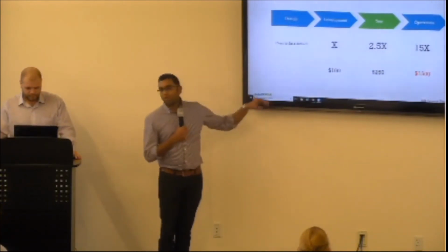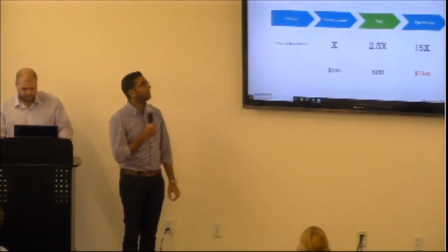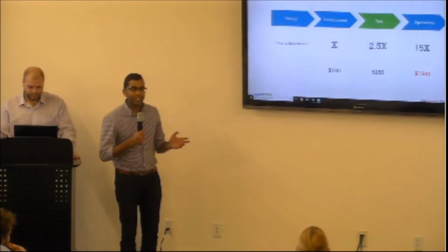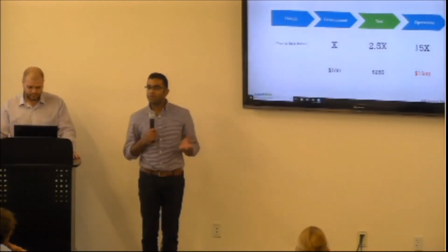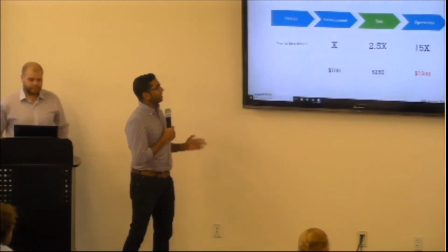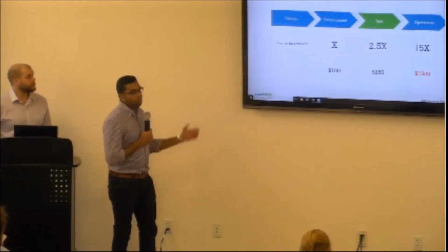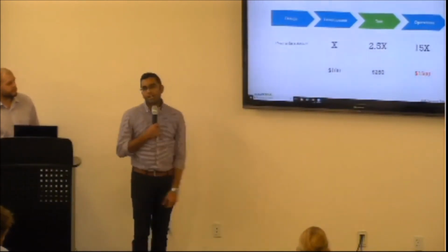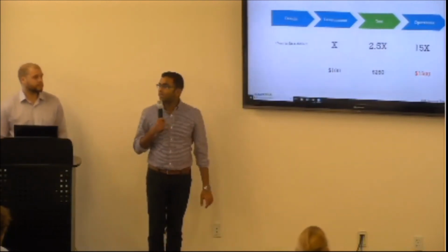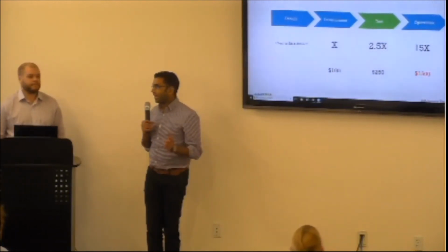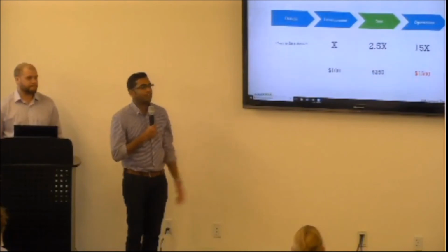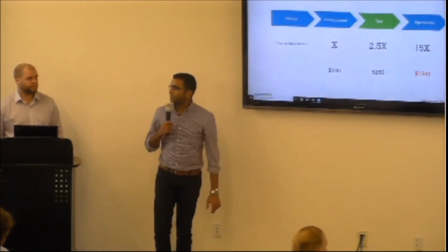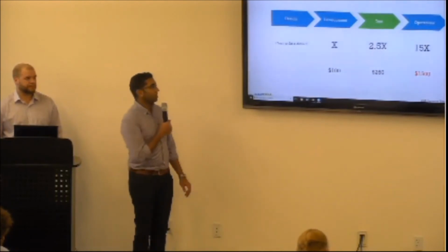And when we try to put a simple dollar figure to it, we're talking about maybe 2 hours on average to fix a bug, and $50 an hour for a developer, just being very conservative here. We're talking about $100 to fix a bug in the development phase, and then as you go right to the end, you're talking about $1,500 for one defect. And most applications don't have just one defect, so when you multiply that 10 times, 100 times, the cost just becomes really high.